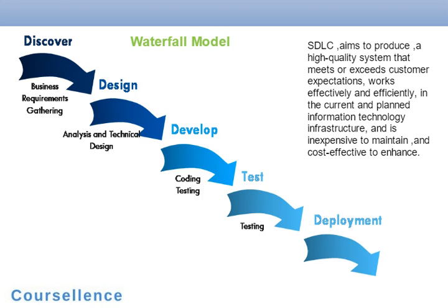In terms of testing, testers are involved only in the testing phase. Requirements are not tested in the requirement phase. It can't be modified, even though we identify that there is a bug in the requirement in the testing phase. It goes on till the end and leads to a lot of rework. It is not suitable for long-term projects, where requirements may change from time to time. Waterfall model can be used only when the requirements are very well known and fixed.